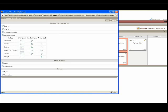Before I close out this customized screen, I want to put out the cycle start and cycle end — this gets into the cycle time reporting. For a lot of teams, the cycle start might be when we start doing software development. Put the cycle start there so the clock starts ticking when the story card goes into the coding state. Then it moves through coding and testing, and when it gets into the accept state, we may put a cycle end. So you can set up when you want the timer to start and stop for cycle time.